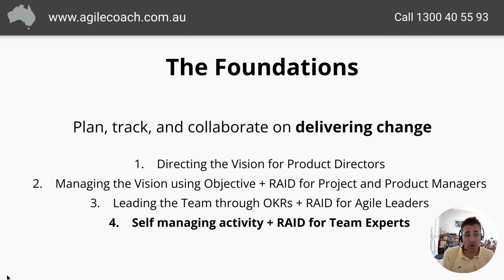So after we come out of quarterly planning, we should have the RAID, the risks, assumptions, issues, and decisions. And we have a set of key results which have been sized, roughly sized, by a team that's experienced in doing that kind of work. They're literally saying that's a big, that's a small. We use a number system so we can add it up at least, but really we're just doing rough sizing. And then they're going to take that into the quarter with a level of autonomy that allows them to work on those key results, being able to raise, again, their own risks and issues at their level, but also be able to plan and track in a very clear and transparent way. And it's that which I'm going to go through now.